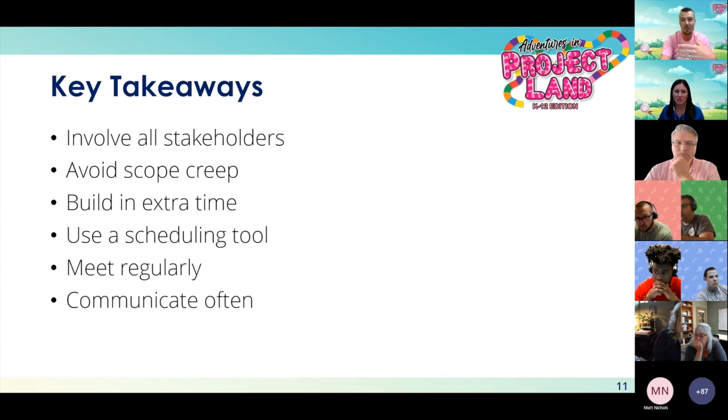And if you have to be accountable to your board, why did you take so much longer than you said you were? You can show them, here's the baseline, here's our plan, and then here's where you asked us to start changing features, and the schedule went over here. So that's one possibility, and that's more about the baseline.